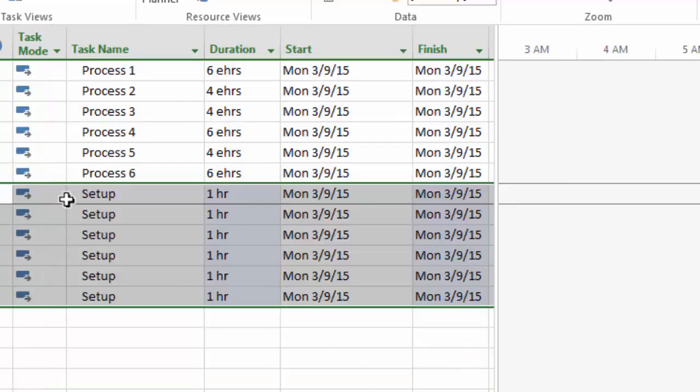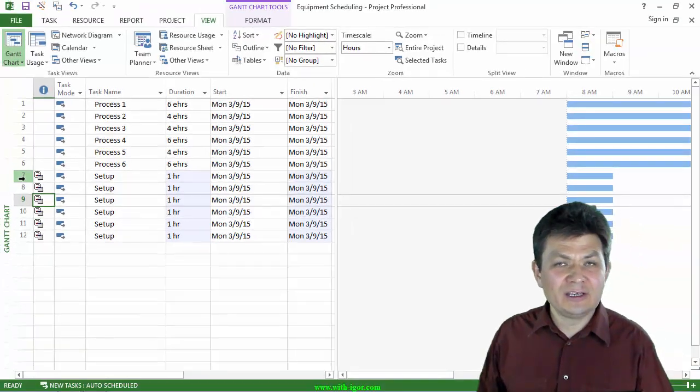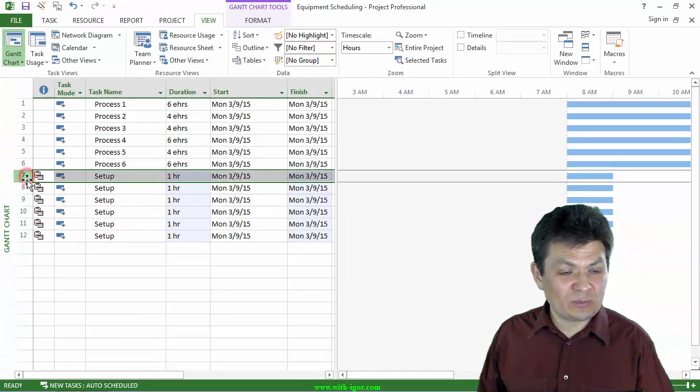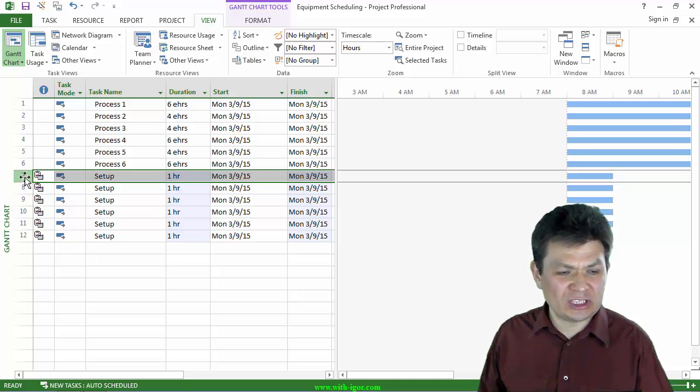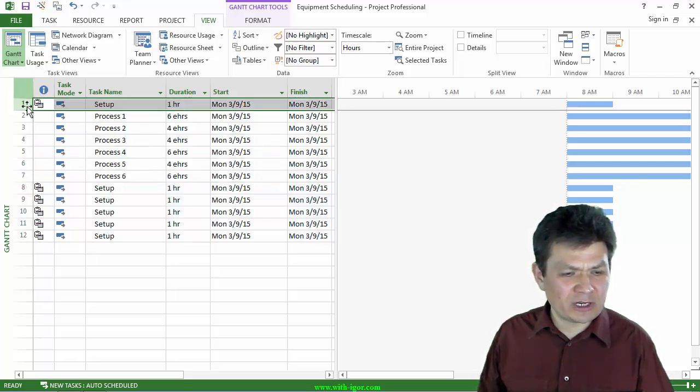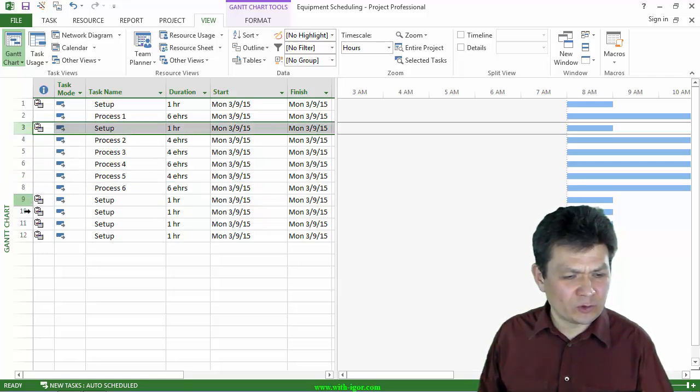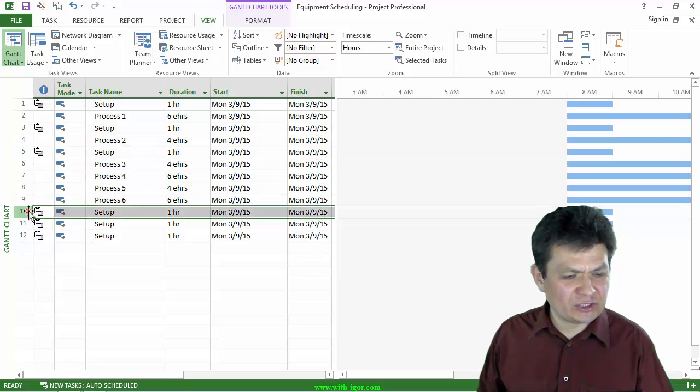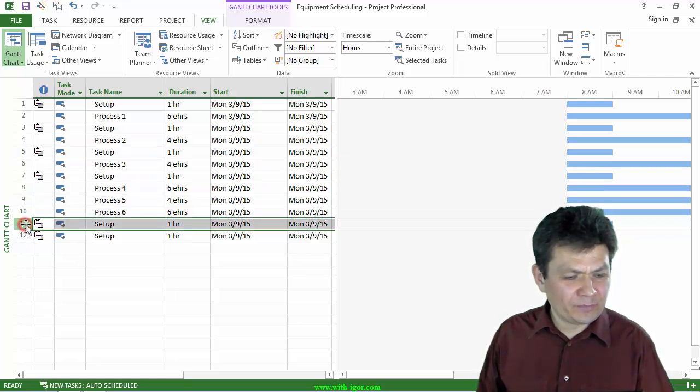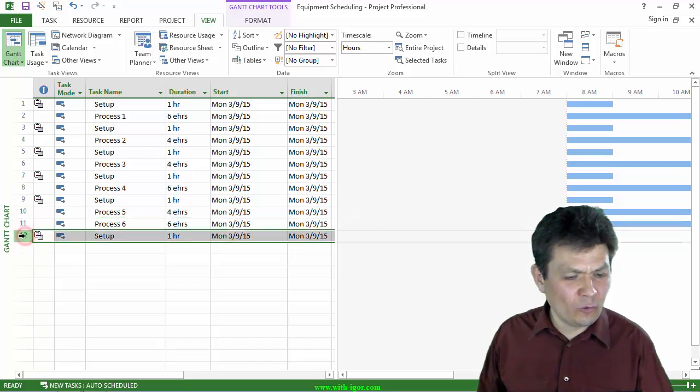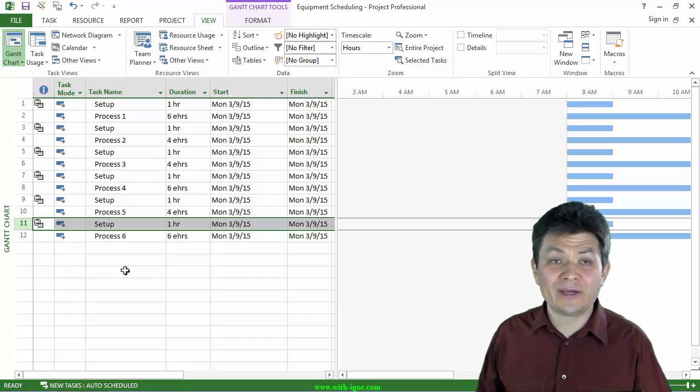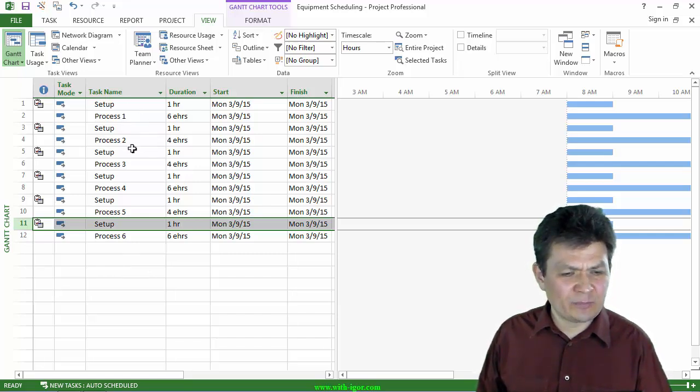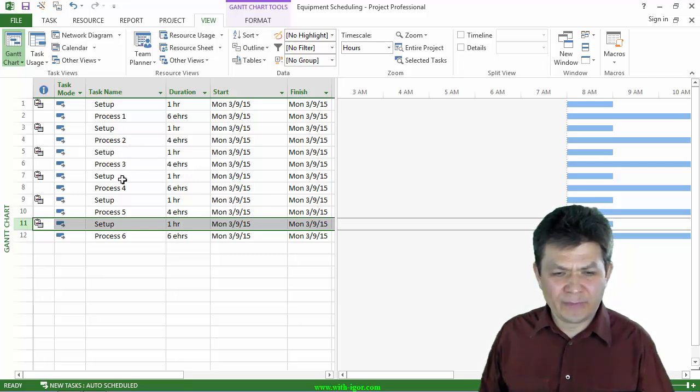So now I have several setup tasks. I'm going to now distribute them so that one of these setup tasks is preceding each one of the processes. So I'm going to select one and drag it like that. And now I'm going to select this other one and drag it before process 2. So I have setup, process 1, setup, process 2, setup, process 3, and so on.